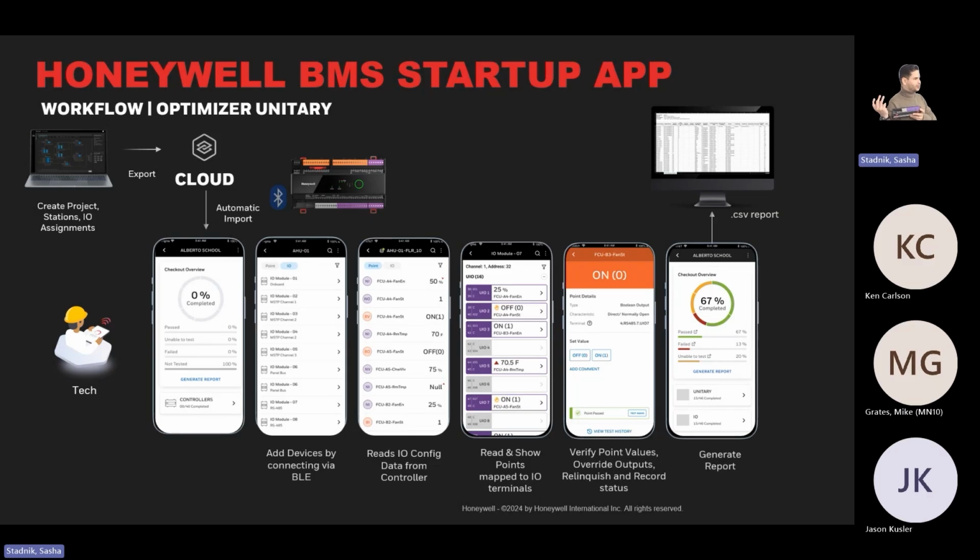And when the programmer goes to the site for commissioning, all of a sudden he finds out that the wiring is still not validated. So they just wasted money and time, probably sending someone on an airplane or driving all the way to that site. And then he realizes he cannot do anything until that wiring is validated.